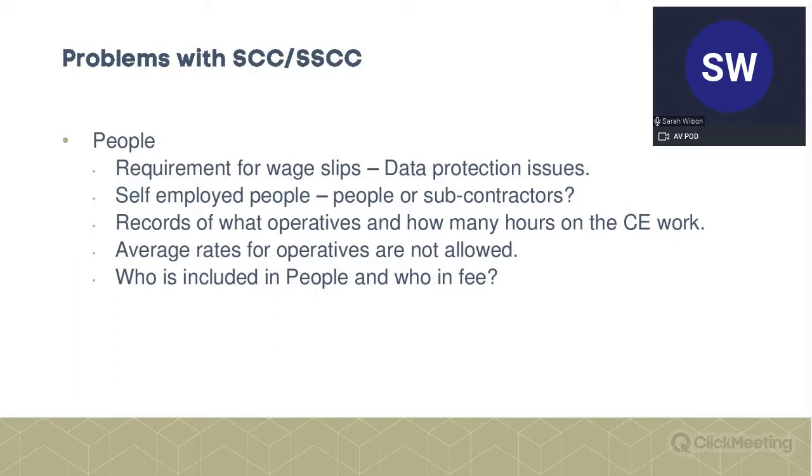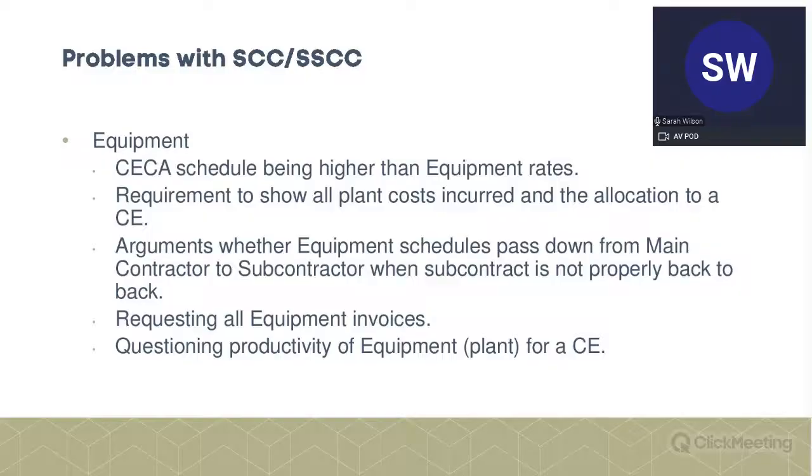I know it's really tedious, but you really, really need this information. You're going to be severely hampered if you haven't got it. Average rates aren't allowed. This point about who's included in the people and who in the fee, we've touched upon this in the context of including your working area as your own offices.